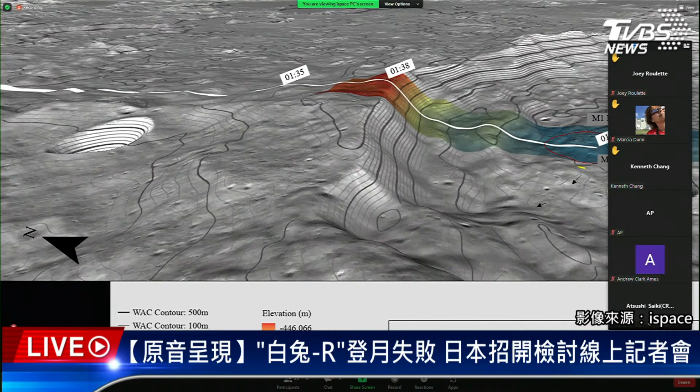In reality it is impossible to run a bunch of simulations with such a setting, so we always need to limit the region used to simulate the lunar terrain. In this landing site case, I would say the terrain simulation region was not proper to capture this crater rim issue in advance.